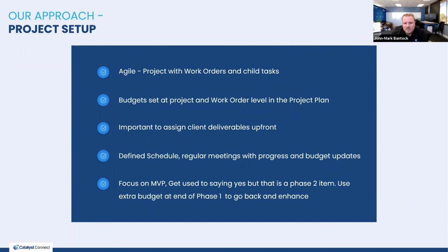As we start to get the user involved in actually testing the workflows and seeing how it's going to work with real data, and that's important, you need to be able to have some test records under real world circumstances so that they get those gotcha type conditions. Then we start to have our child tasks to go through this iterative process, and we make sure to budget for that upfront.